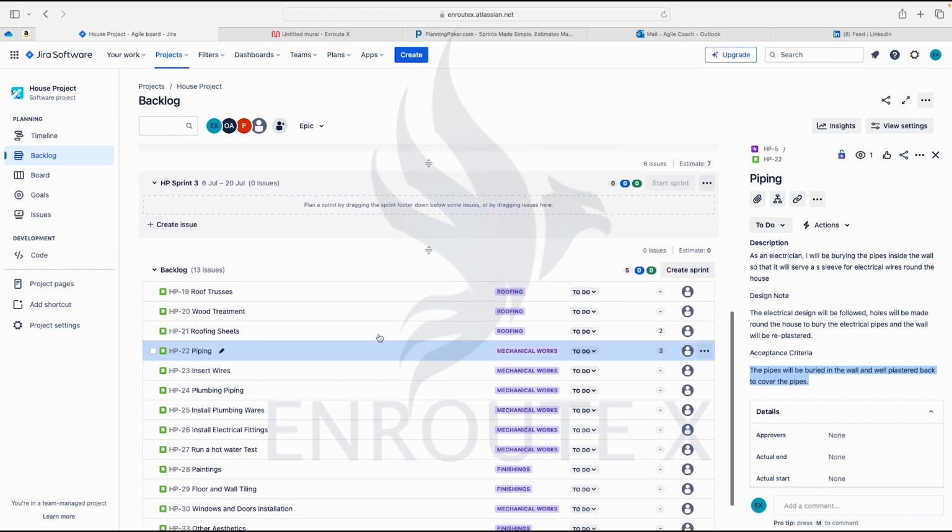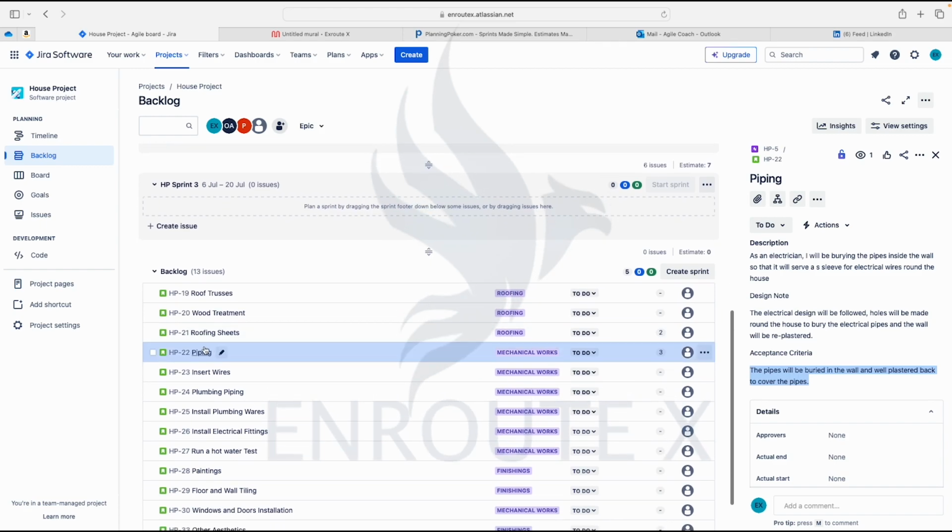So when each story meets it, in this case now, we've discussed this story. We know we have the capacity to work on this story. We know we have the availability to work on this story. We know the resources needed are ready. We know everything is ready. Then the story meets the definition of ready. And it has a value. It's what we need to work on now.